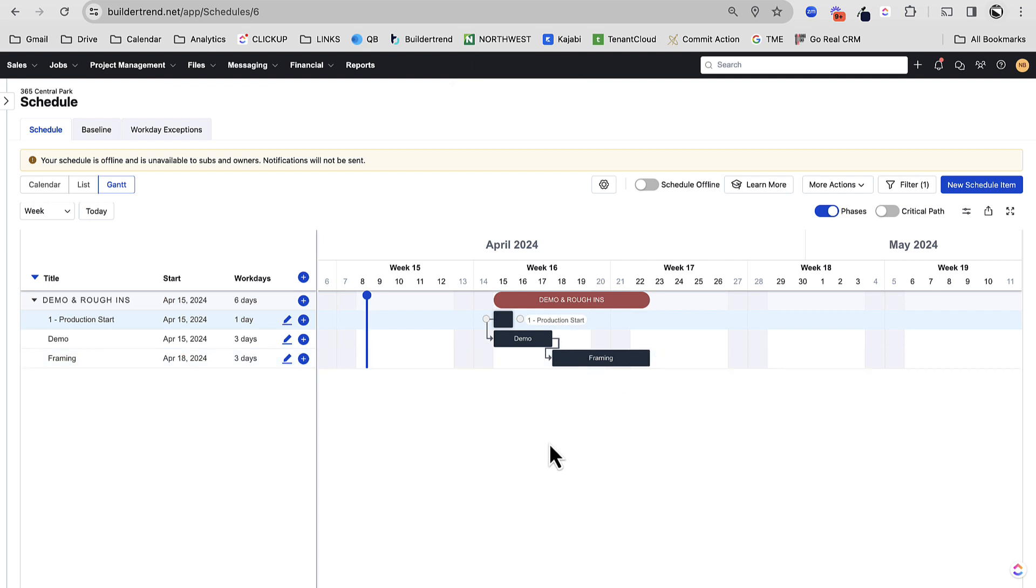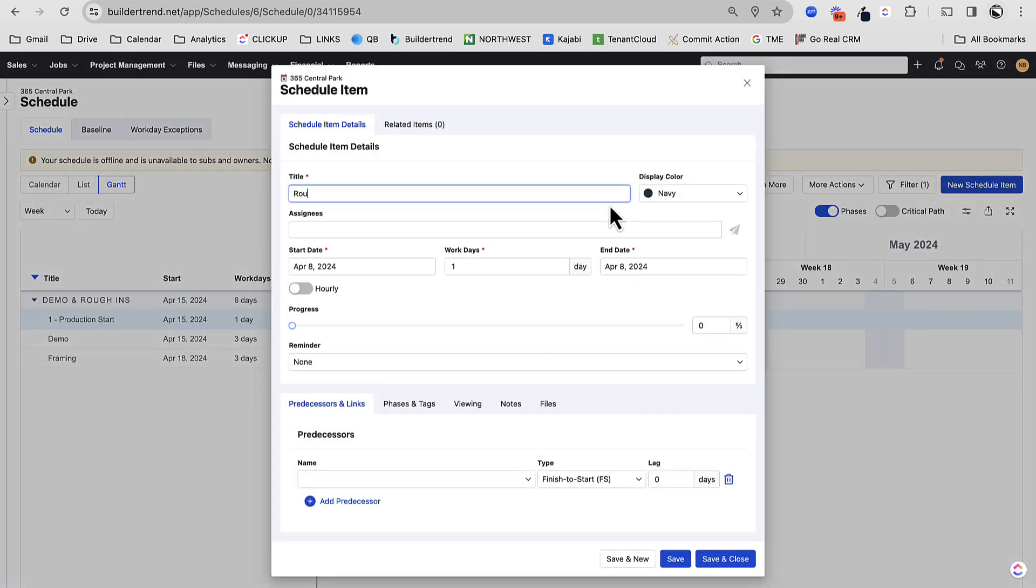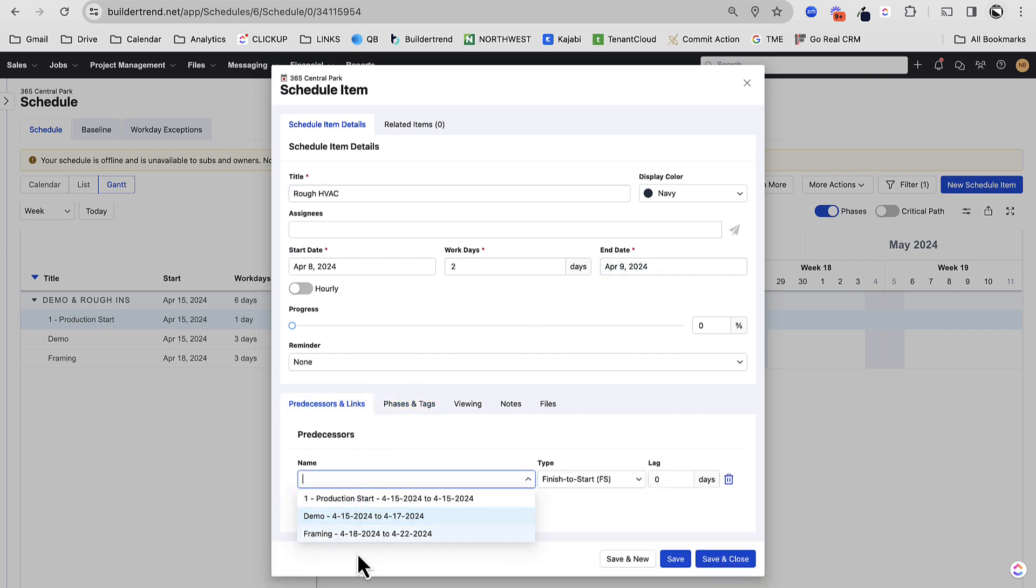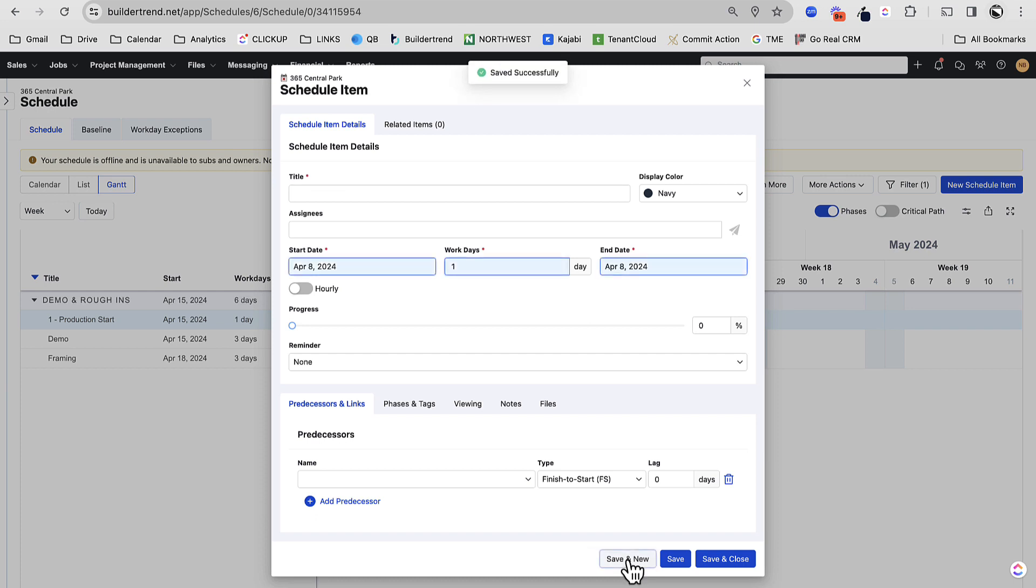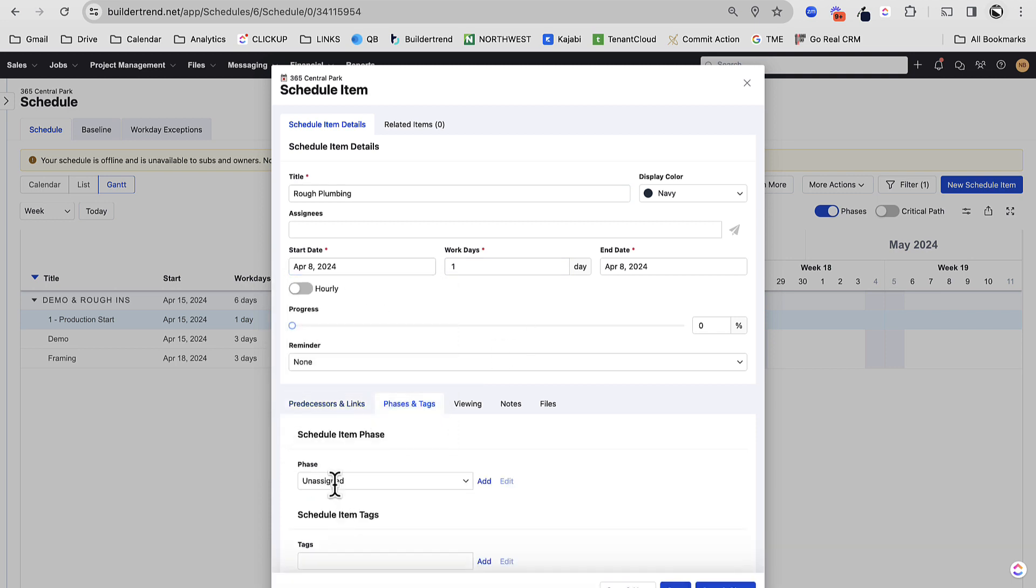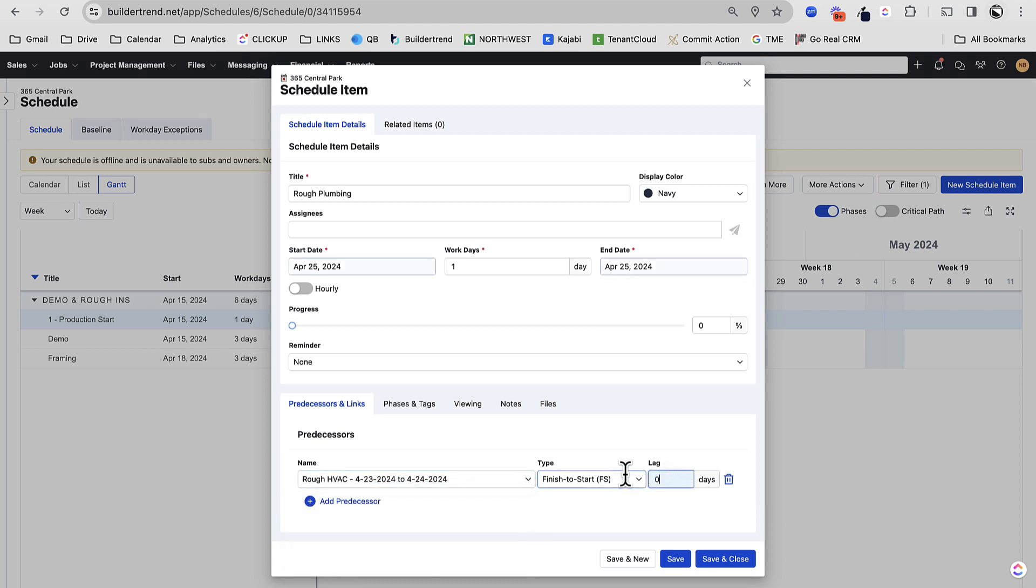So you can see it starts to build out nicely. Now, let's just do a couple more, rough-ins. And let's do rough HVAC. Let's say that's two days. And that's dependent on framing. Now, you can see this kind of takes a while. That's why templates are going to be so helpful. Rough plumbing. Let's say rough plumbing is three days. And I don't want to do my plumbing until my HVAC is done.